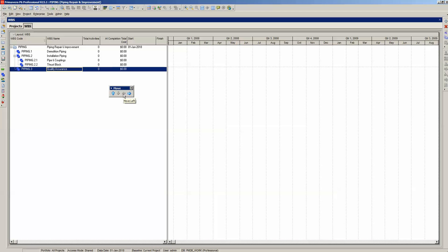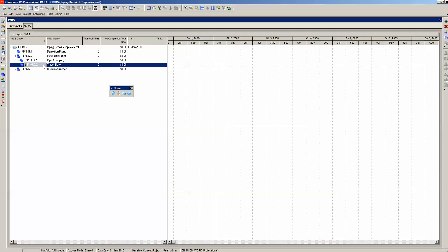Your WBS is entered. The key point is that P6 always creates a child WBS element of the highlighted WBS element, so sometimes you will need to out-dent the WBS element to make it a sibling. Note, if your WBS code is incorrect — say Thrust Block should have been 2.3 — you can highlight the WBS code column and enter a number. When you do, it automatically appends that number to the parents of that element. We want our Thrust Block to be Piping 2.2, so entering 2 automatically changes it to Piping 2.2.